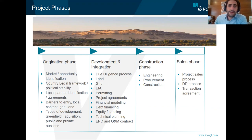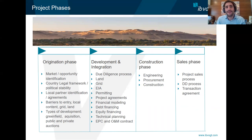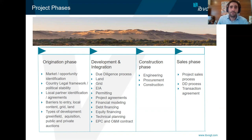In the development and integration phase, we scrutinize what we need for the successful bankability of projects. Here we analyze the land available, the grid connection, the environmental impact, and all the permits and contractual obligations that are needed for securing debt financing, such as financial modeling, technical planning, and EPC and O&M contracts. Once secured, we move into the construction phase of the project, and then finally, if we decide to sell the asset, we move into the sales phase.